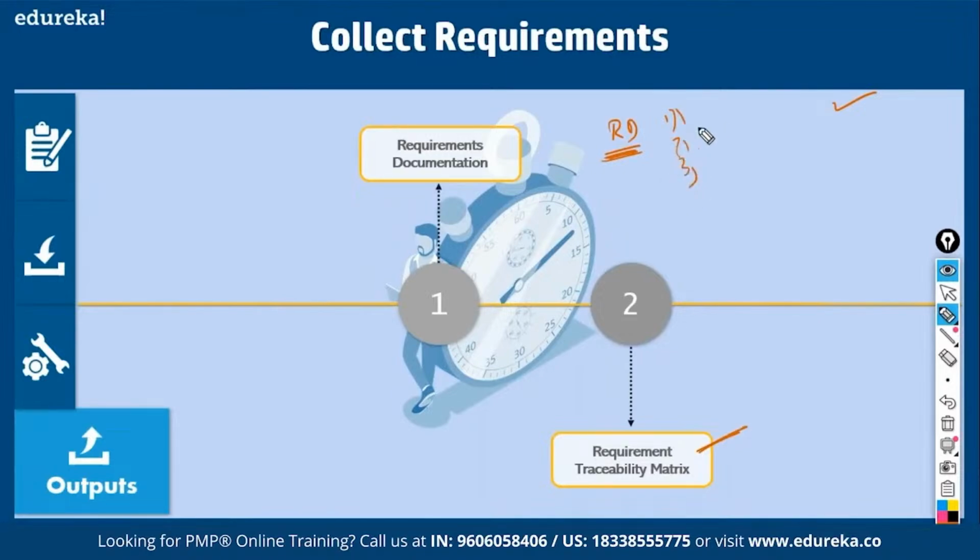And then he'll say, what are the mappings for these requirements? For that, you have what is called as requirement traceability matrix. So you have to map the requirements to high-level business need. That is, you want to be the market leader. Then you may have to map this to architecture drawings, then database procedures. Then for this particular prototype, you would have done a lot of tests, test cases, test scenarios, test conditions, test results. So you have to map it through all these, and only then you're going to sign off. Okay, that is called as requirement traceability matrix. Okay, so when you collect requirements, you also stipulate what is the template in which you'll be demonstrating compliance with requirements to the stakeholders later on, so that you'll get a formal acceptance.